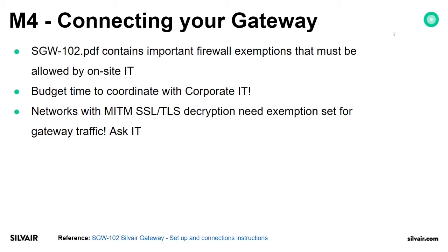And again, the connection manual for the gateway contains important firewall exceptions that must be allowed by on-site IT. It is very important to do it before going on-site with the gateway. This should be coordinated with IT on-site.